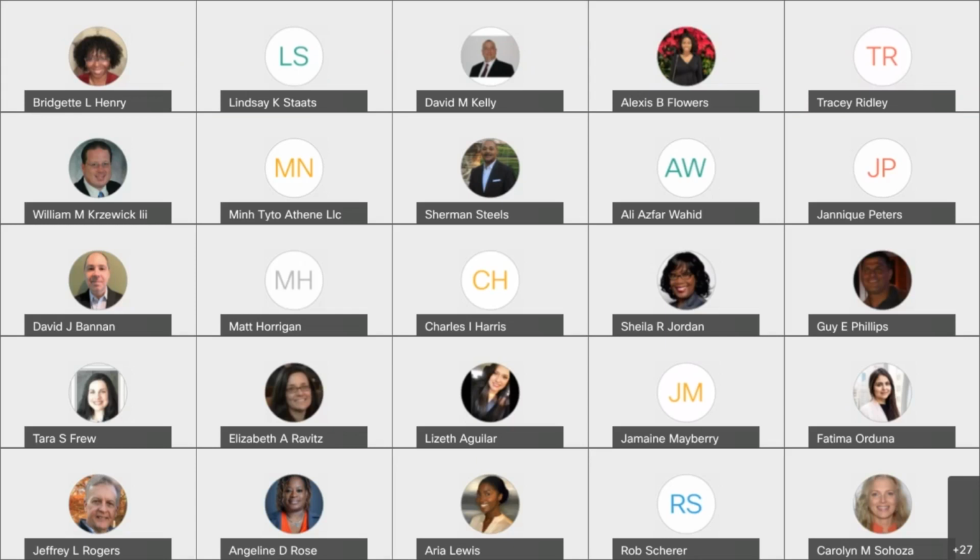Anyone? Oh, the project manager. It's his project. Absolutely. Great answer. Thank you. The project manager is ultimately responsible for knowledge transfer. His or her project. Sorry. No problem. No problem. Thank you very much.